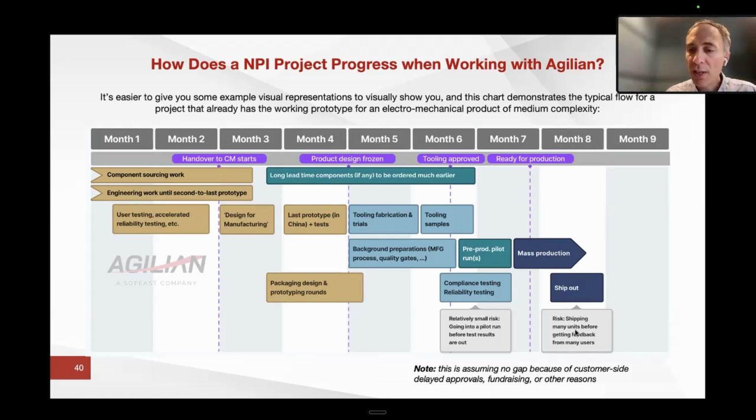There's a little bit of a risk here also, in that maybe you haven't gathered a lot of feedback from representative users because you try to do everything in a very tight schedule. So maybe some of these samples can be sent to representative users. They're going to use them with expected, normal kind of use. And then after 1 month, 2 months, 3 months, you see what they tell you if you have any feedback.